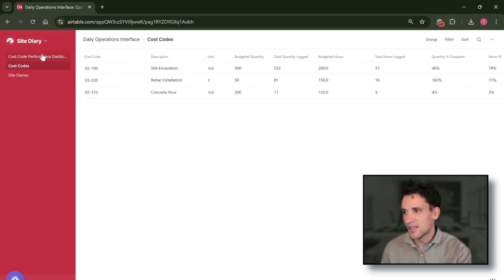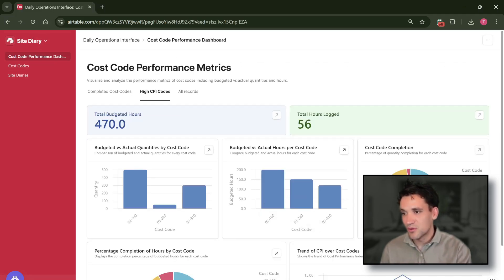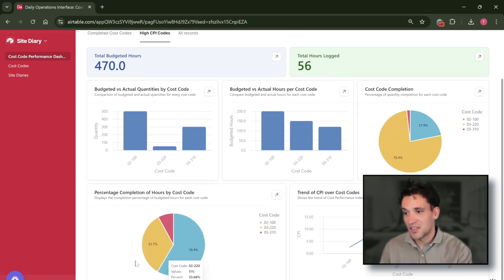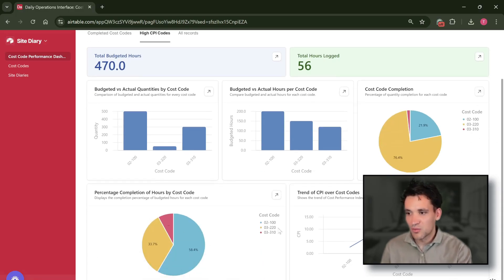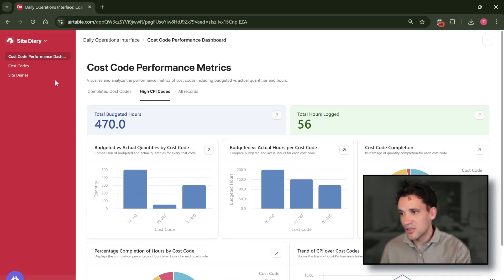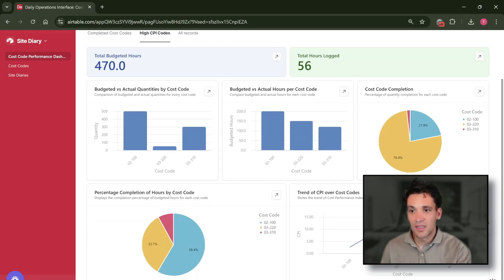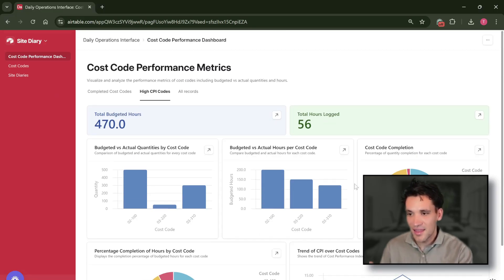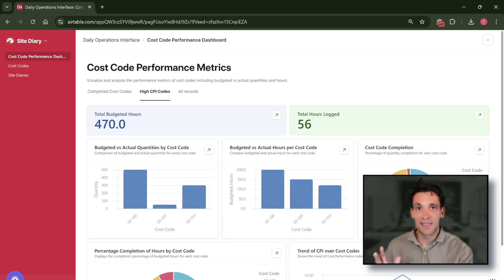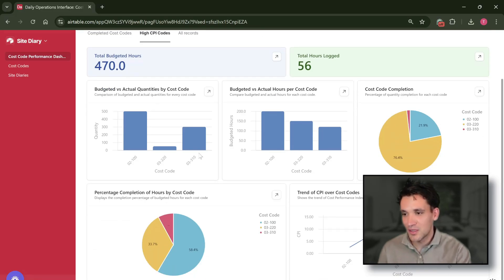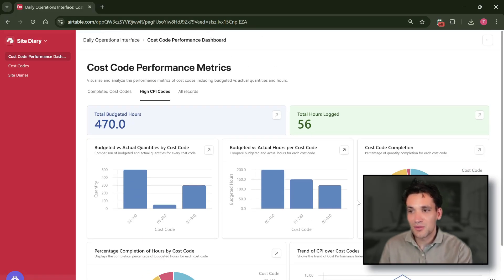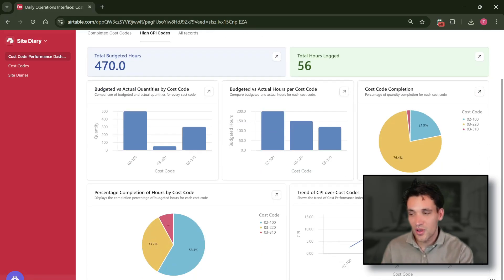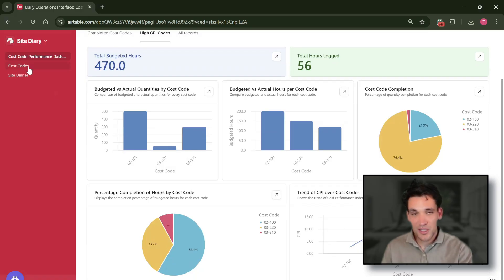And then we've got a very simple dashboard that just shows the percentage completion by hours, the budget versus actual, the cost code completion, and then the CPI of each of the cost codes. Again, this I've built in literally five minutes so it doesn't look that good. You can chop it and change it to show any sort of data you want in a much better way than this.